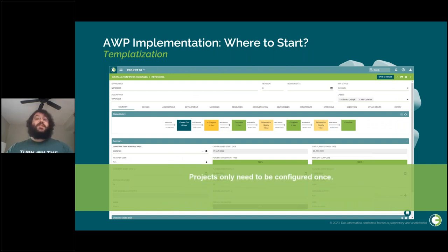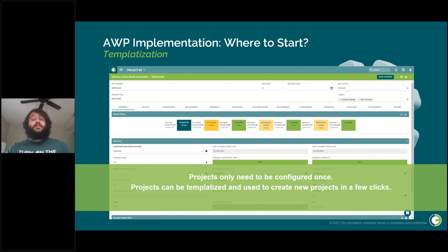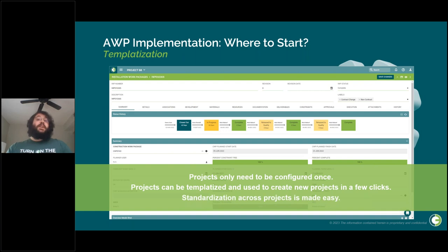Dashboards aren't the only thing that can be templatized in O3 — projects only need to be configured once, and then they can be used as templates for future projects. Disciplines and constraints, approvals, execution activities, and workflow settings can all be wrapped up into a template, meaning less redundant entry and clicking. It's also another step you can take in standardizing your AWP procedure, making keeping your AWP process in line across all your different projects easier, which in turn means easier administration moving forward.